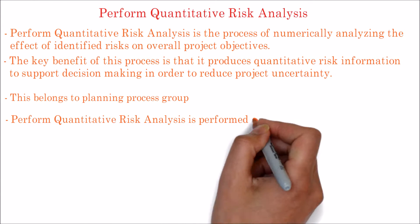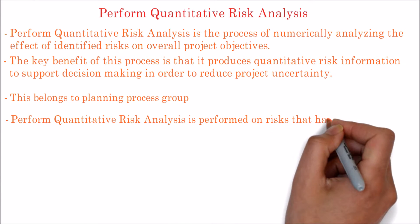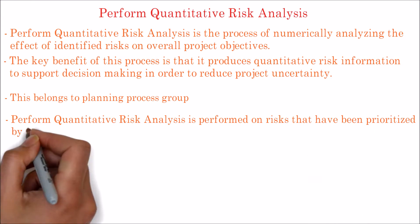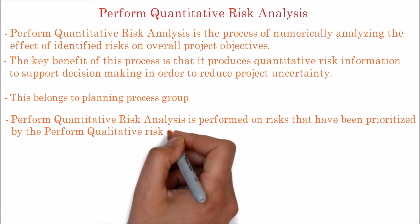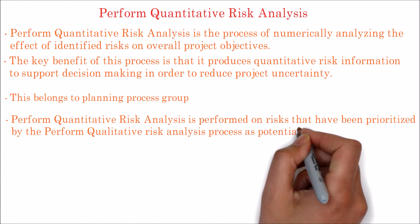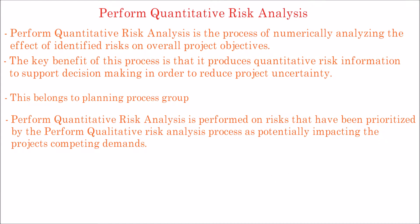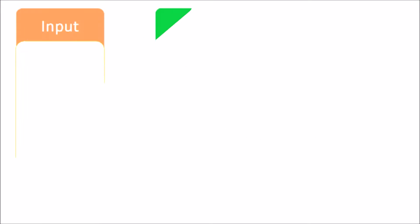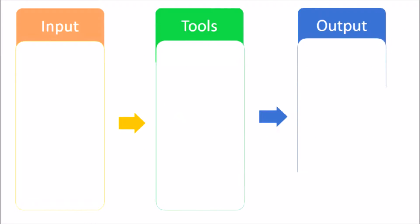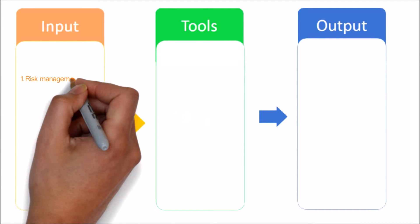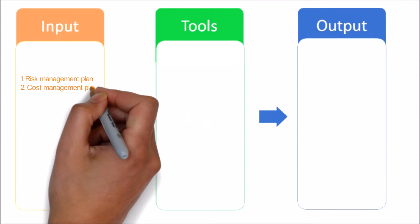Perform Quantitative Risk Analysis is performed on risks that have been prioritized by the Perform Qualitative Risk Analysis process as potentially impacting the project's competing demands. Let's see the input, tools and techniques, and output of Perform Quantitative Risk Analysis process.